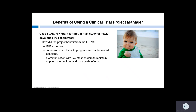How did our PET Radio Tracer project benefit by having a CTPM? Having someone who is an expert on sponsor investigator INDs alleviated the risks of not knowing what we don't know. The CTPM was able to educate the team on what they needed to know about INDs for their role, and was able to provide key insight on institutional policies around this kind of study. This helped everyone understand the order of operations, as well as how their role fit into the big picture. By working closely with the team, roadblocks to progress became apparent, and the CTPM was able to work with the team to find a solution. In this case, the investigators were struggling to find time in their schedules to work on the scientific documents the IND required. The CTPM was able to find time with the investigators to have working meetings one hour every week. By communicating with key stakeholders, they were able to maintain the support and momentum the project needed to move forward, as well as coordinate the efforts of the overall team.